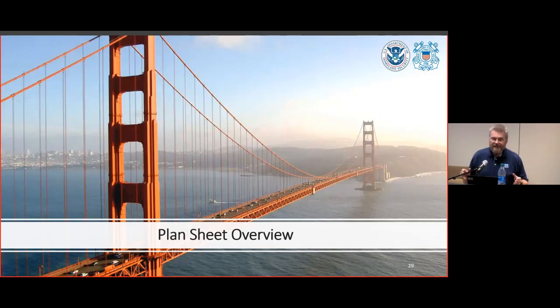That does not mean that it's going to take the complete 90 days. As long as you guys have been talking to us, you know, we've been talking to GDOT, we've been talking to the consultants, we've been talking to all the other cooperating agencies. If we've had robust communication, then it could take considerably far less than 90 days. I don't want to say 10 days or something like that, but we give ourselves that 90-day window. But again, depending on the quality of communication, it would be a lot sooner than that.